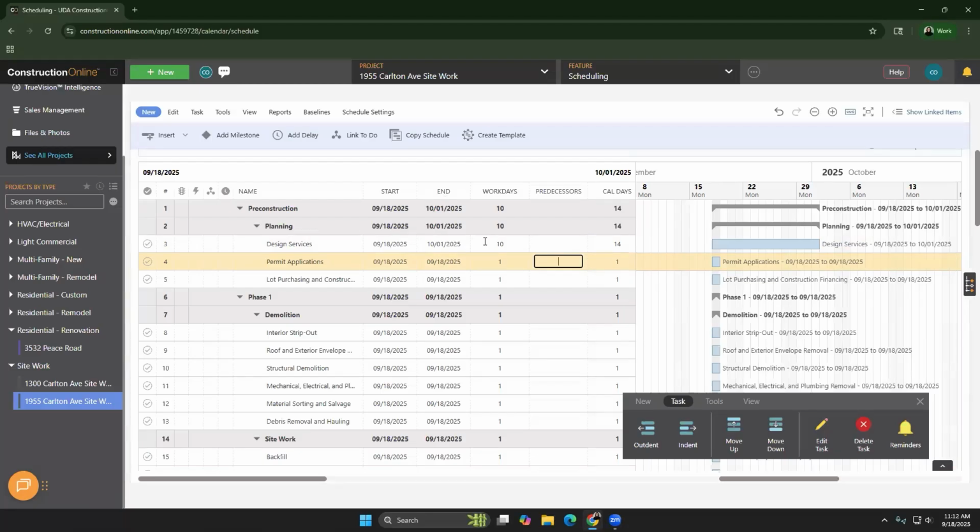So if I know that something's taking 10 days, I can plug that in and get really easy updates on those end dates. Okay, so you mentioned these calendar dates as well on the schedule. How are these going to be different than the work days? Yeah, so work days are the days that your crew is actually at the job site. So let's say your company is only open Monday to Friday or Tuesday to Saturday. It's going to take a look at those dates, take everything that's not in those work days that you've established and basically pull them out. So for example, something that may take 10 work days may only take 14 calendar days. So we can establish those work days within the system directly and update those with what days we're on the job site, what days we expect to have off for holidays, or anything customizable like that.